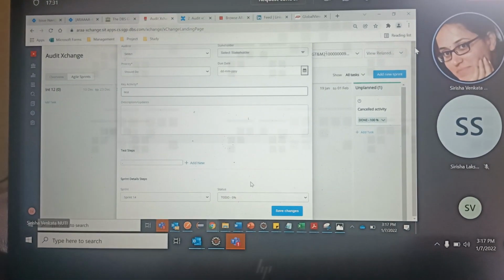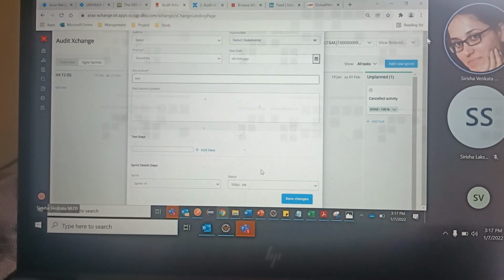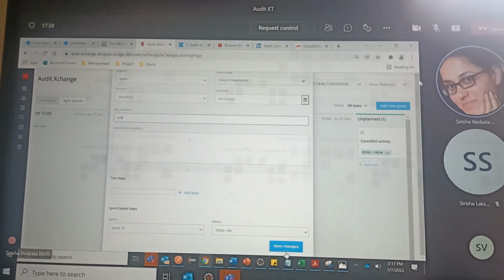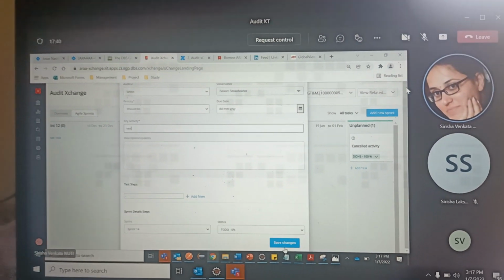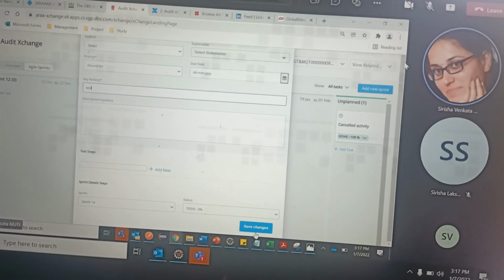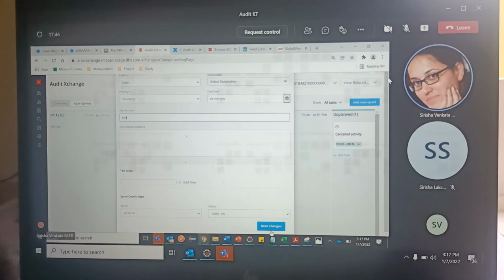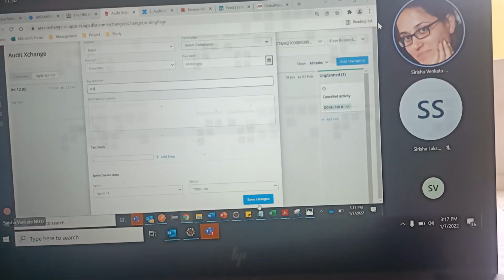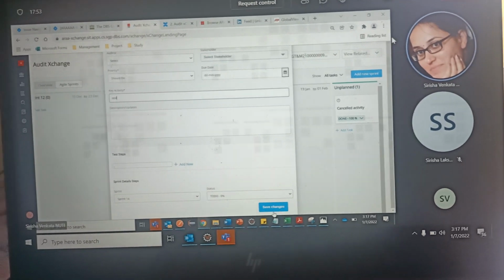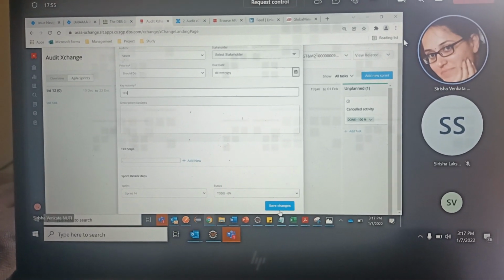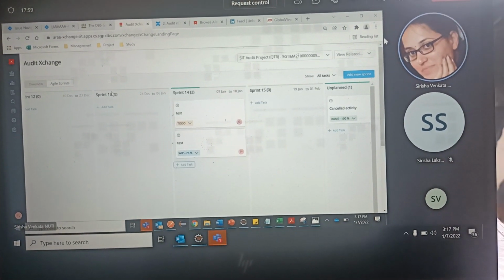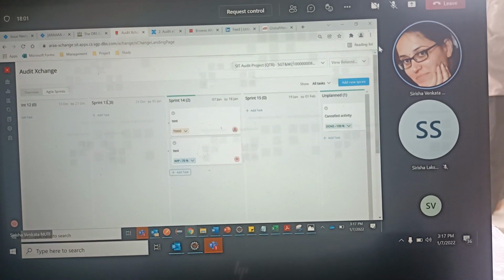Okay. So now it's 75 and 0. It will take the average, 38, and then it will say that you have 38% completed for the current sprint. The overall progress is for all the sprints, whatever tasks you have completed from sprint 1 to sprint 15, and then the unplanned tasks you have. So that overall tasks percentage is shown here, and this is for only the current sprint.